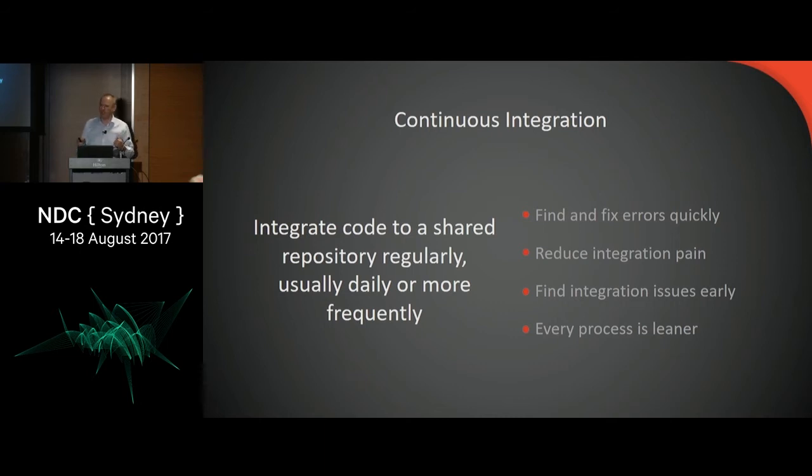All of the design issues that we might find, they're now found at the start of the sprint. And as the sprint goes along, the code reviews actually become shorter. So we found that maybe it takes me 20 minutes, 30 minutes to do a review near the start of the sprint. Towards the back end of the sprint, maybe it's only taking 10 or 15 minutes to do each day's worth of review. That's because they're mainly fleshing out code, adding tests and error handling, that sort of thing. It actually becomes a lot quicker.